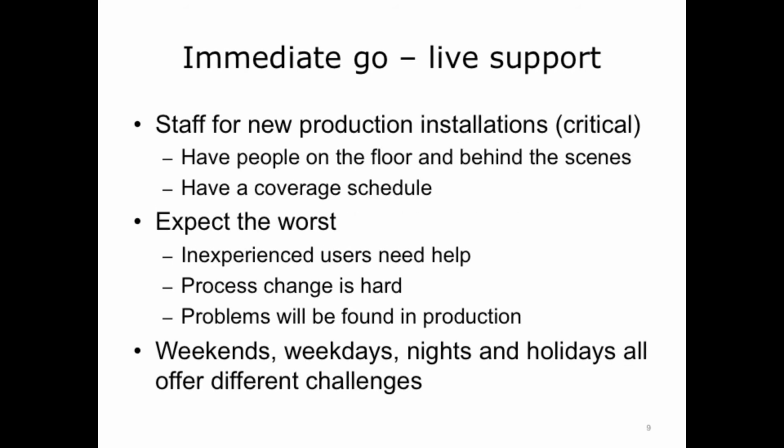The time right after go live is a time for extra vigilance in support. Expect the worst, as inexperienced users need help. Process change is hard for users, and problems not detected during the testing phase will be found in production. Make sure to staff appropriately with people on the floor and behind the scenes. Have a coverage schedule, because if serious problems arise, people will need relief. Weekends, weekdays, and nights all offer different challenges.